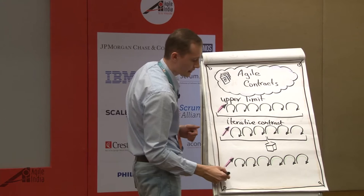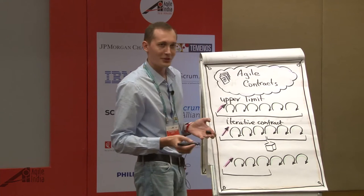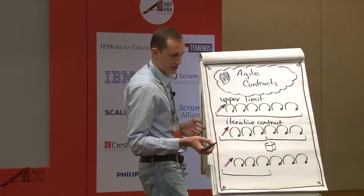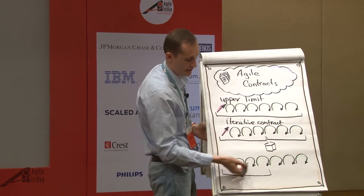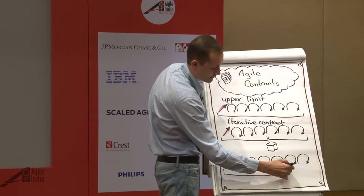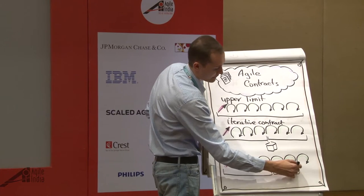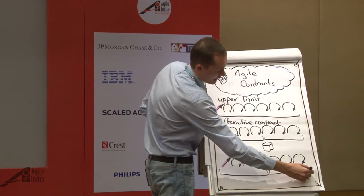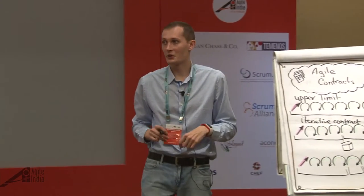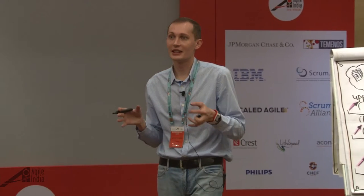Or you can do an extreme example of iterative contracts — after three sprints, just contract for one sprint at a time. Some organizations have one-sprint-length contracts. We build something iteratively, so why shouldn't we have an iterative contract for that?